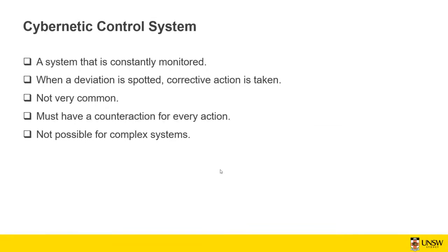It's not very common because, as you can see, it's time-consuming to constantly do the earned value analysis, maybe every day or something like that. You also must have a counteraction for every action, and it's not possible for complex systems. So the question is, does cybernetic control suit construction projects? Do you think yes, no? Do you have time to constantly monitor it? Perhaps no.